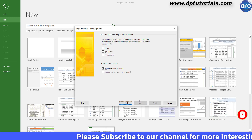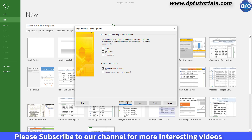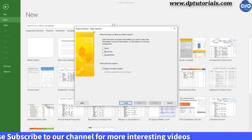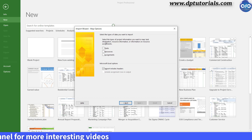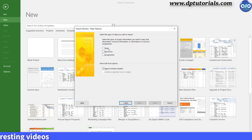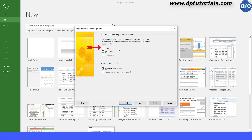In the Map Options section, you need to specify what kind of data you would like to import. In this case, it is just activities, so select Tasks. If your Excel workbook has headers, keep this checkbox ticked like this and click Next.